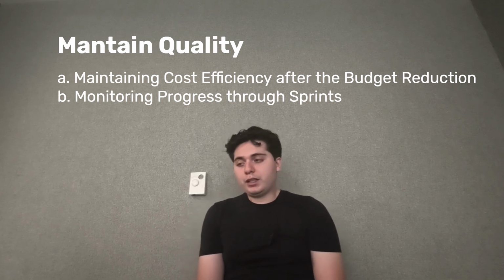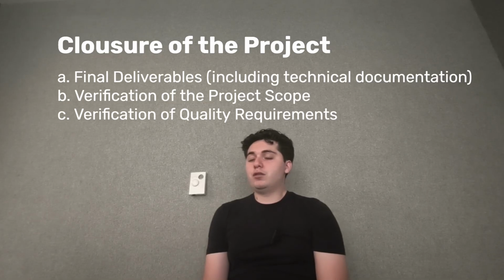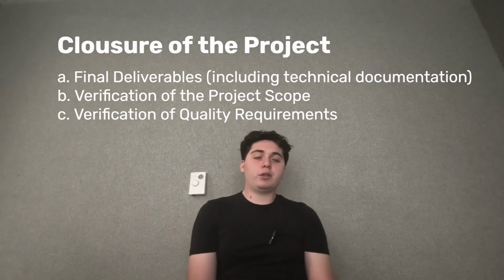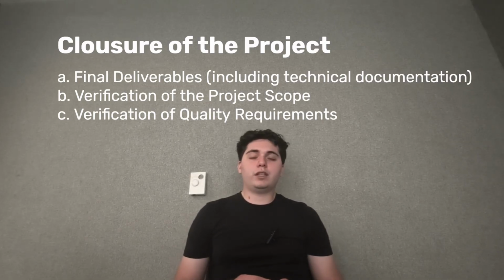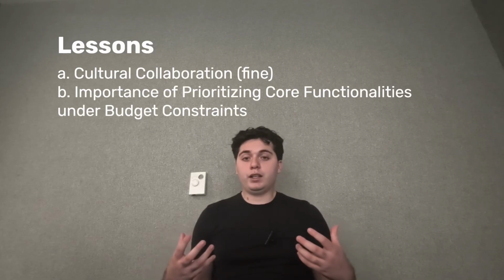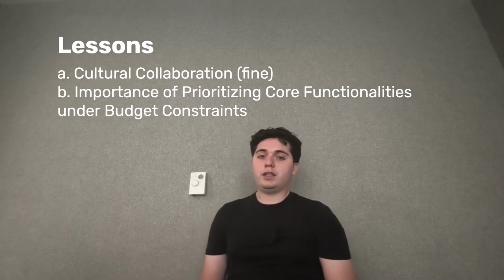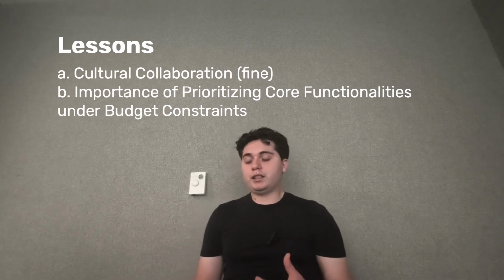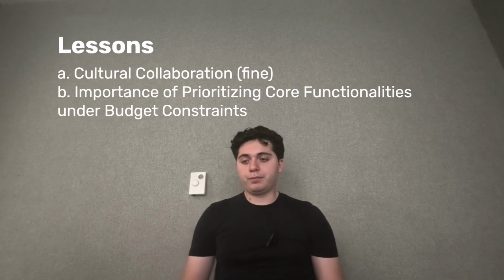At the end of the project, I will prepare a project closure report, including the final deliverables, verification of the scope and qualified requirements, as well as documentation to determine technical decisions. One lesson from this project is the importance of intercultural collaboration when integrating expertise from different cultures. Another lesson is the importance of prioritizing core functionality when facing budget compression.